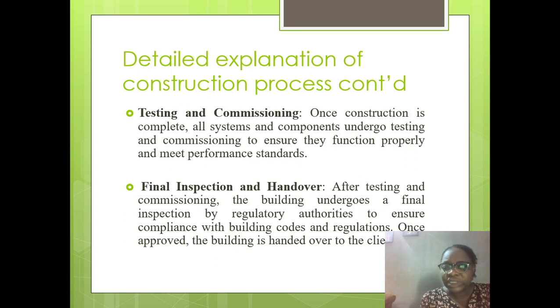We have another stage, which is testing and commissioning. After the previous stages have been put in place, all the work done has to be tested and then commissioned, and all the systems and components undergo testing and commissioning to ensure they function properly and meet the performance standard.